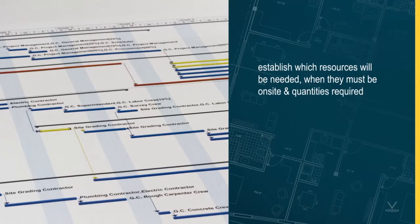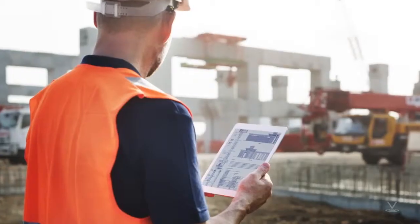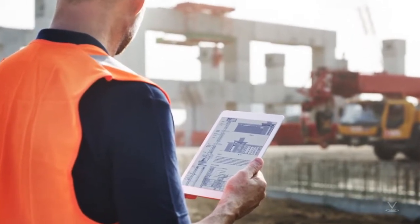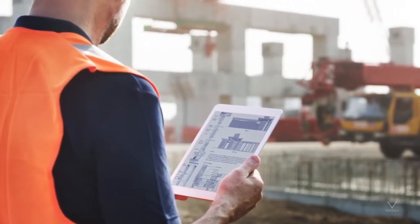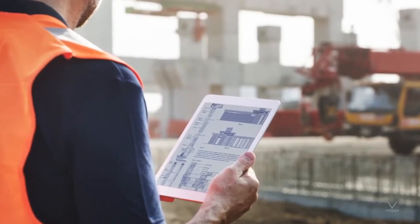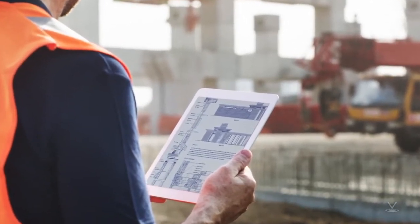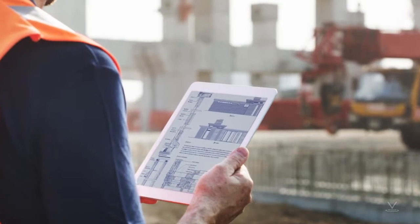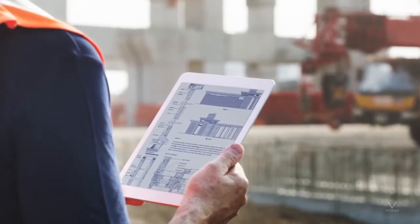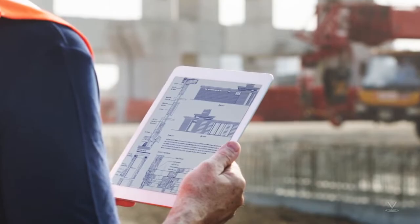Where shortages, conflicting demands, or delays occur, the project manager must devise appropriate remedial measures. The project plan and schedule may have to be modified to accommodate or work around supply problems. The scheduling and allocation of workers, equipment, and materials are interrelated. It's important to remember that an action affecting one often affects the others in some manner.